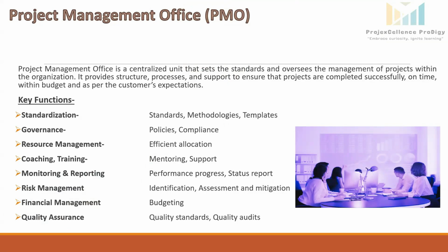A key function of a PMO means the primary roles and responsibilities it performs to enhance project management within an organization. So what are these? Standardization. PMO develops and enforces standardized project management processes, methodologies, and templates. For example, a project charter template. So it will create a uniform project charter template which will be used across all the projects in the organization.